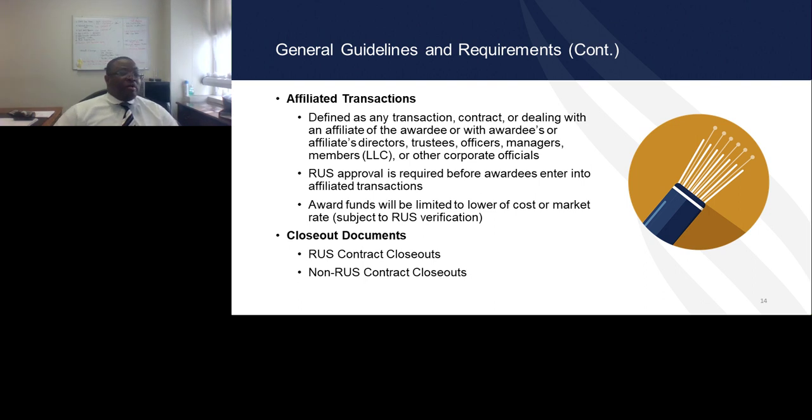RUS approval is required before awardees enter into affiliated transactions. Usually, those affiliated transactions are covered under an affiliated services contract, which has already been approved or must be approved by RUS prior to even the submission of the contract.